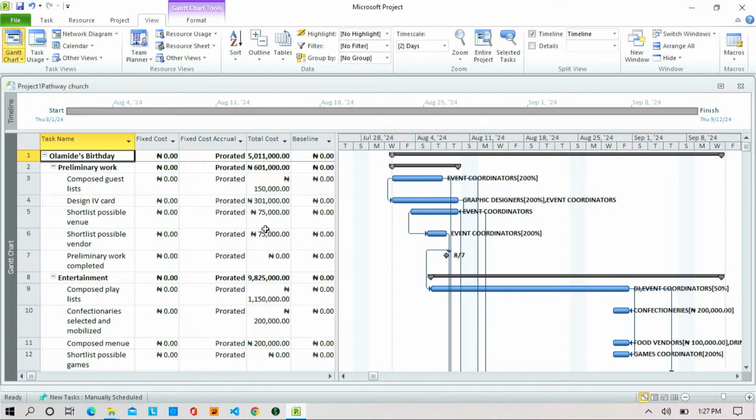It's the most expensive because you have done everything according to you, but the client, based on what is documented, not based on what he thinks, feels that Emeka did not use Dulux, and they could test it and verify that Emeka actually did not use Dulux to paint the house. So they now ask him, Oga Emeka, please change paints to Dulux as agreed. That is a defect repair.